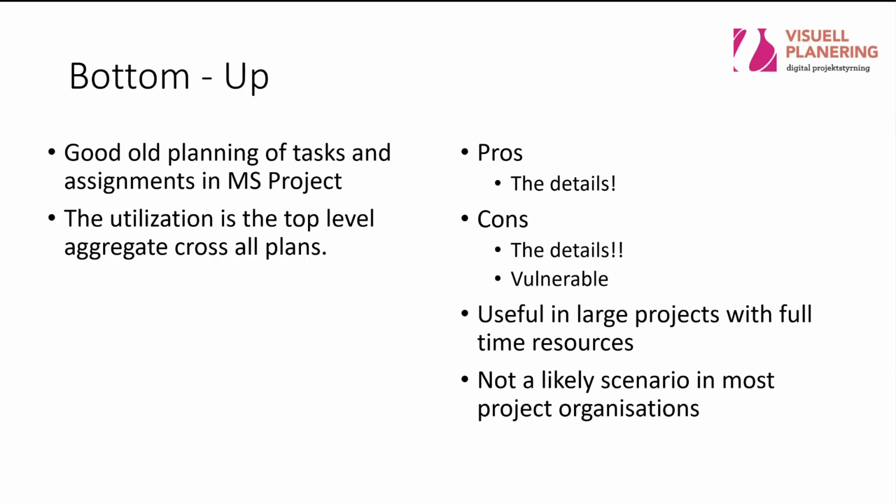The disadvantage is then, of course, the details, because this becomes very vulnerable. The nice-looking report will be nothing more than a nice-looking report unless you are sure that everybody has updated the plan. So typically this scenario is useful in a large project with full-time resources. And I think you can agree with me that that's not a likely scenario in most project organizations today.